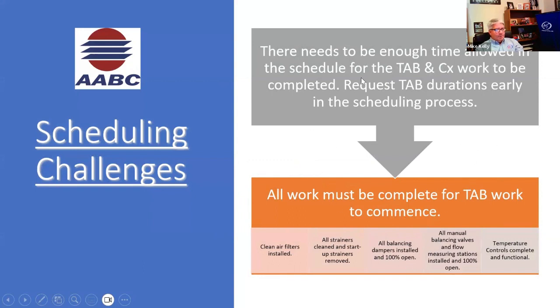can't express it enough. We're always asked to do 10 weeks worth of work in 4, just get more guys on the job, more technicians, and that doesn't work. It works to get a job done, but the accuracy and things get missed, and then they wonder why down the road there is a problem with the job, and they point a finger at the testing and balancing to say, oh, they messed up and didn't see this. Well, you had me running around with 18 different crews, and we had 10 weeks worth of work to do in 4, and then you cut it down to 3 because you had to do system flush or building purge or whatever it may be, and it gets cut short.